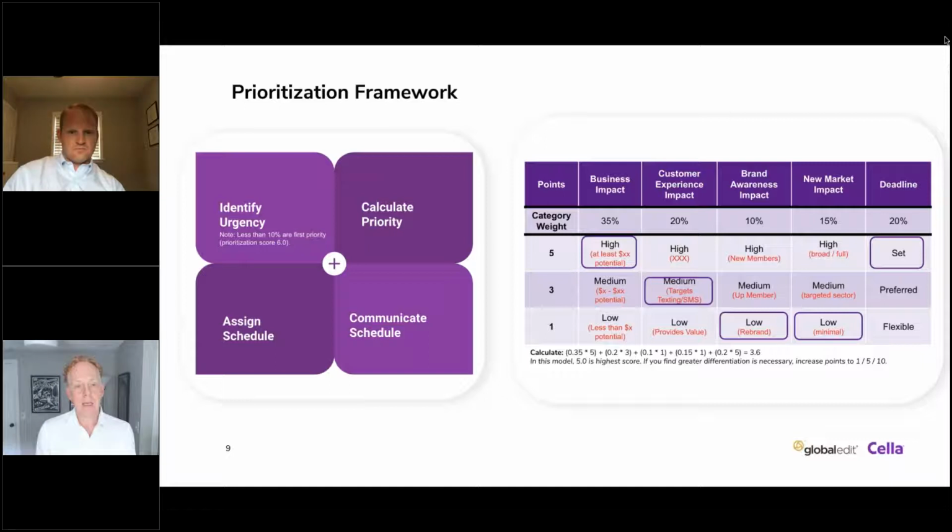And there actually is a formula that can be set up at the point of intake that asks the appropriate questions to then classify the work across low, medium, high levels of complexity. And as a result of that classification, all of the downstream processes can pivot accordingly. And I think this is so cool because this is the framework for measurement, which, as you helped us understand,